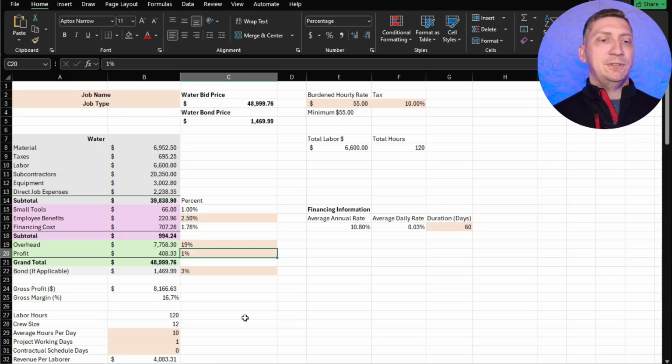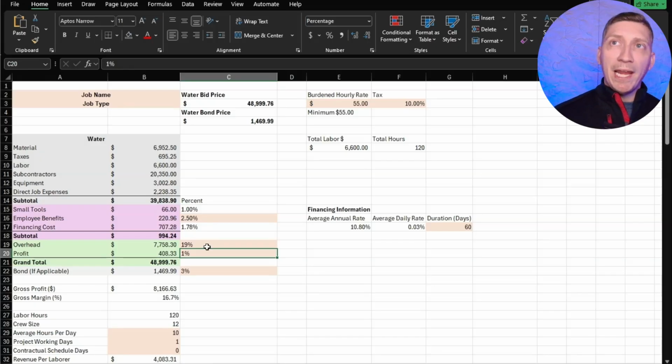The goal isn't to charge more money. The goal is to know where every dollar that you do estimate, you can precisely know where it's going. We know $400 of this is overhead. We're not marking it up 50% and ranging between 5 and 10%, because the problem with doing that is if you have a 10% retention, I'm waiting on my 10% the entire project. Now if I have a 5% profit, I am paying 5% to build this project until 2 years later when I finally get retention. And that's not a good way to run a business. We want to know where things are, how it's all flowing.